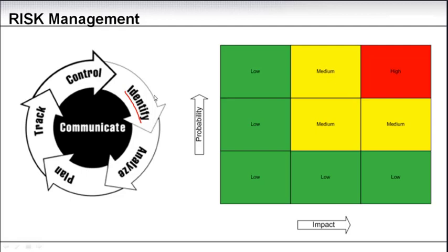And once you have identified the risk and analyzed it, the output is that you have a risk probability and impact assigned to each risk. And here I have shown you a chart or matrix which is commonly used. I've used it on all of the projects I've been engaged in and heard of. So for probability, you put in a value, and you put a value on the impact axis.